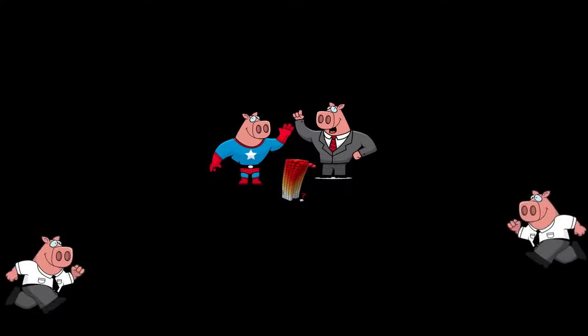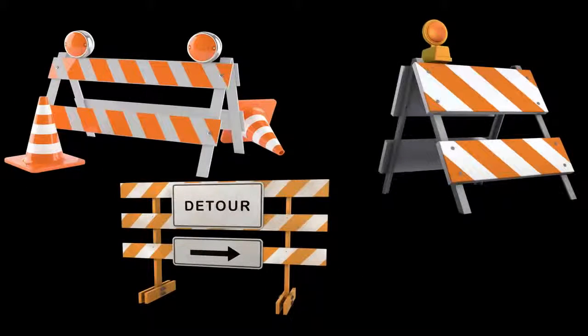Daily stand-up meetings or scrums are used to quickly find out what work has been done since the last scrum, what work will be done before the next scrum, and what impediments need to be removed so the team members can function at peak efficiency.